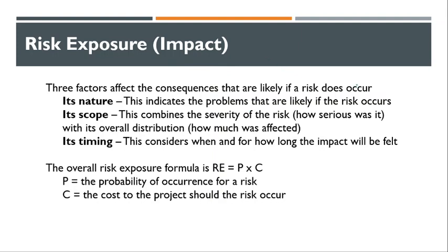Here we mainly have 3 factors that affect the consequences that are likely if a risk does occur. These factors are its nature, its scope, and its timing. Please do remember these 3 factors that affect the consequences.